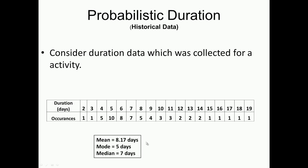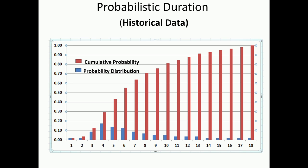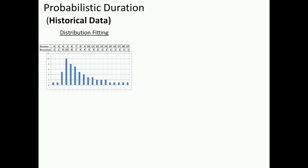Now if I was going to use this as a critical path method, I wanted a single deterministic duration, I am going to take the mean, I might take a mean duration, or we might say the mode is also a possible duration I could use. Well, this is something which has to be discussed and might be finally you need an expert judgment to be able to bring this into it if I am going to use a single duration. But how do we take this and try to fit a distribution to this? This is what we would ideally want to do if historical data was available. So I could make a frequency plot of this and then convert the frequency plot into a probability distribution or a cumulative probability distribution as shown here.